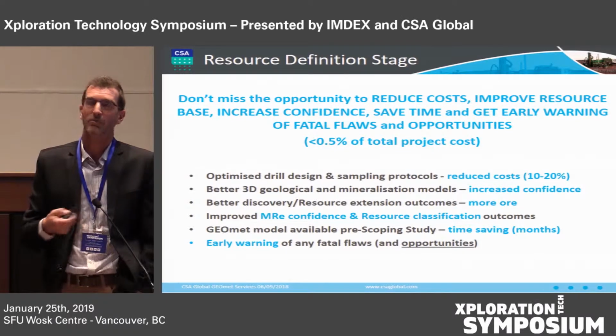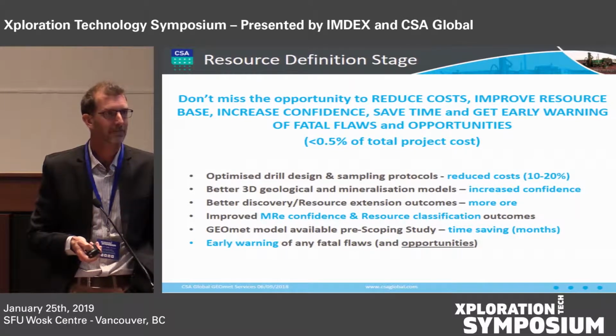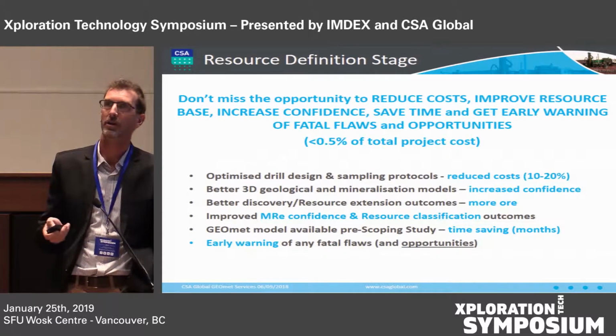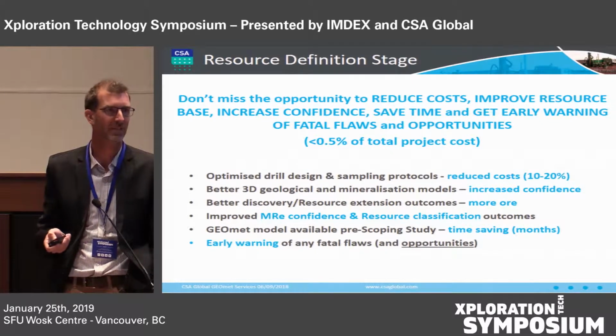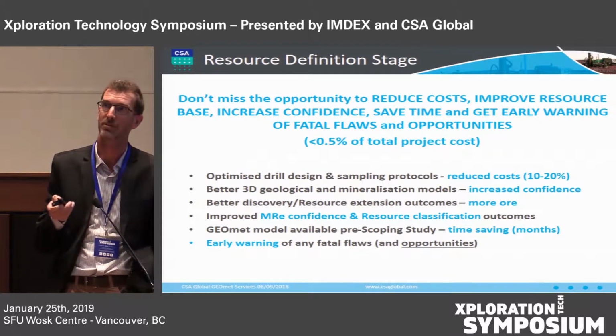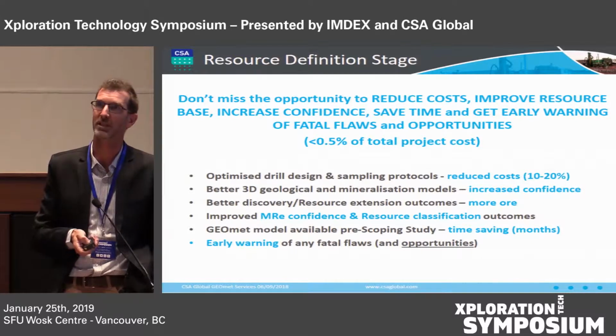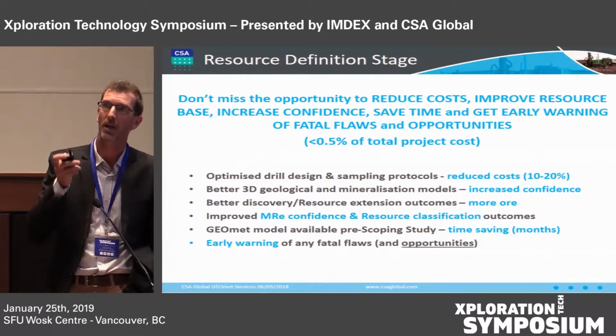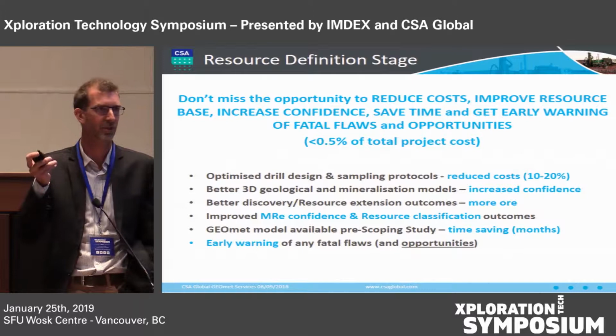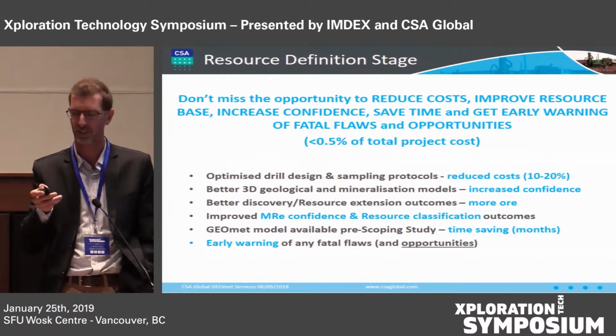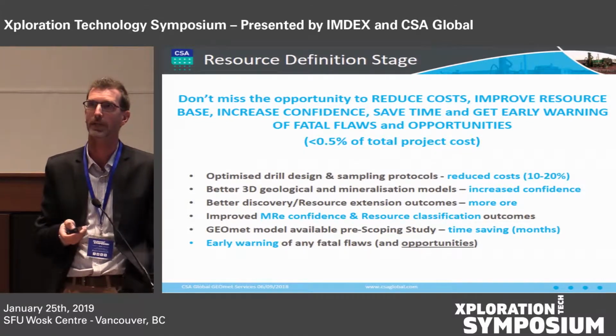So at the resource definition drilling stage, you do not want to miss the opportunity provided by good data and good, quantitative interpretation of those data to reduce your costs, or you can read the rest for yourself, okay? But at this stage, the total project cost, it's well below 1% of the total project cost to collect these data, so why would you not be doing it?